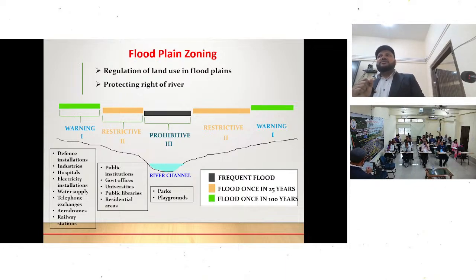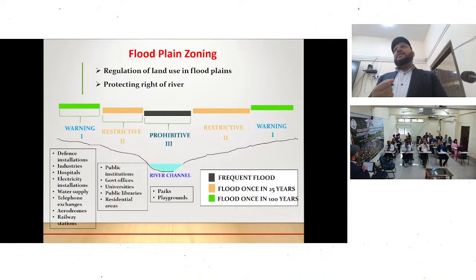Now, the ministry also enforces this: if any state government applies for central funding under any flood management scheme, like FMB, then first do floodplain zoning, come with the demarcation of the floodplain, and then we will allow our funds.